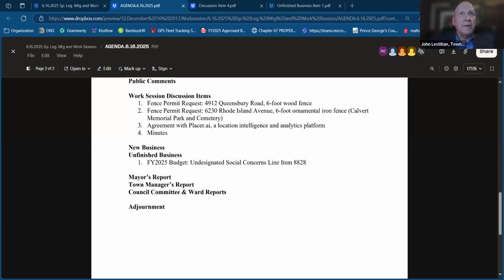Yeah, so the permit for the fire alarm was issued within the last few days. And so now that the permit's been issued, the work can be scheduled and completed. And once that occurs, then we would have the inspections and the punch out work completed, and then work towards the permanent use and occupancy permit.